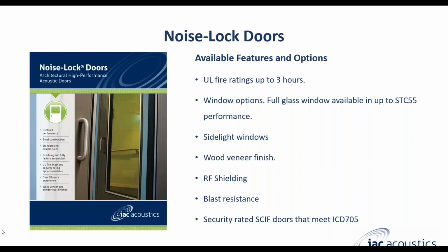In that instance, when we could not source it, we worked with our supplier and got some samples of veneer that they recommended were a close match or would look very similar. We provided some samples to our customer, who provided them to the architect, and ultimately a sample of a different species was approved for us to use because it was a close enough match in appearance.